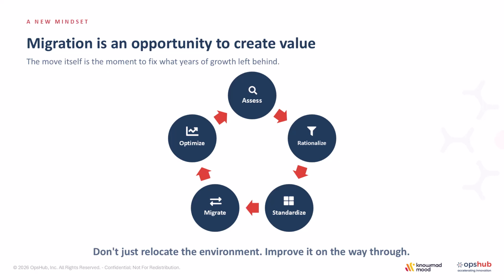And then do the migration and optimize the team structures as a part of migration and workflows as a part of migration. Right? So this way, you actually get the benefits of modernization right away, rather than a pure lift and shift where you basically bring everything, all the historical tech debt along with you into the modern tool.